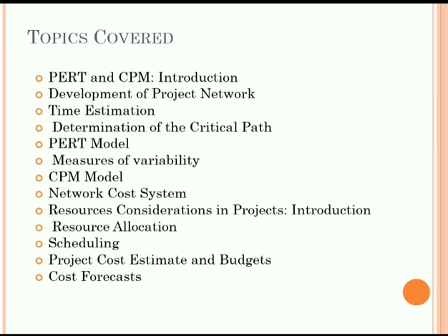This will be conducted to control the quality throughout the project life cycle. These things define how the quality standard can comply with the defined quality standard. The output of the quality assurance will be the input for the quality control, while the output will be quality control measurements, meaning validated changes, verified deliverables, work performance information, then change requests, then project management plan, then project document updates, then organizational process assets updates. All these things you will be getting as the output of the quality control process.